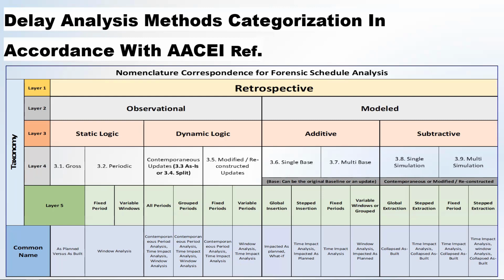However, in some cases, and I have witnessed some of these cases, the employer requires an observational method to analyze any delay analysis. Why is that? I don't like to say oblige, but it gives some kind of obligation to the contractor to structure the schedule properly and do a proper update on an adequate, timely basis. So I will be doing the updates and having them well recorded, and I will use officially submitted records to support my delay analysis in the case of observational.